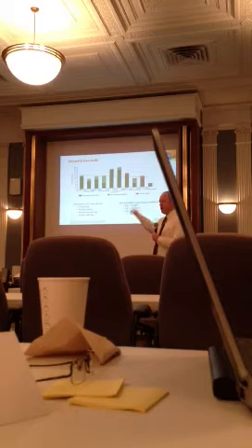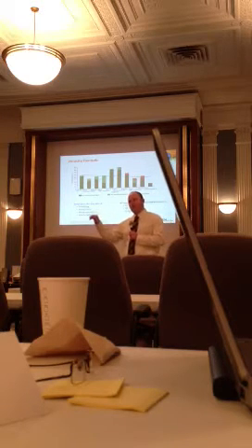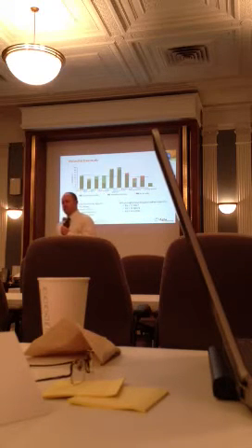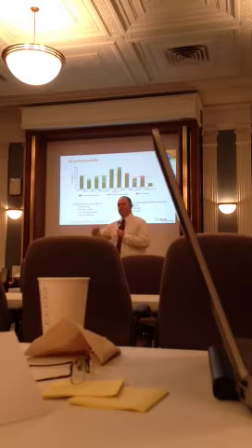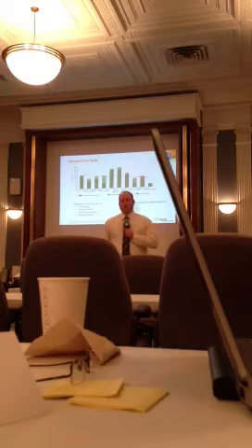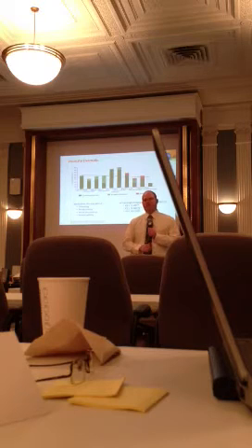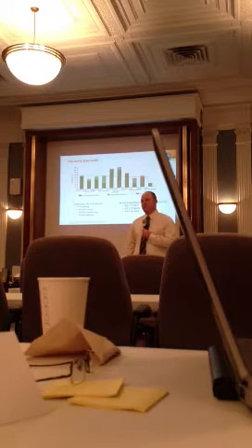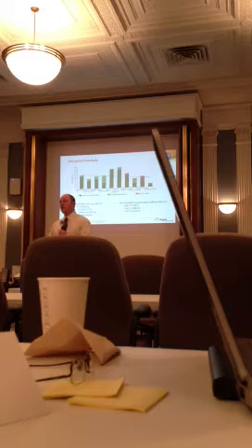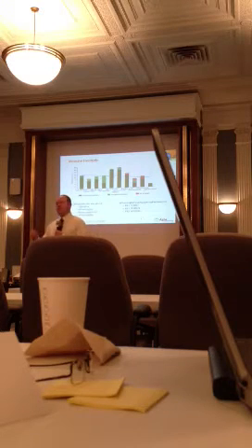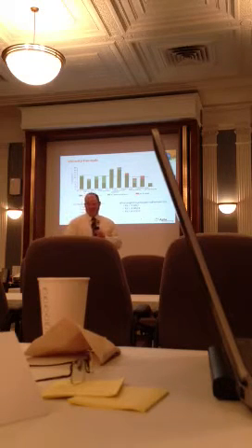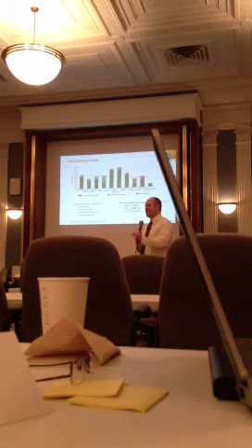So I let my team commit to 100, knowing that with a full staff operating at full effectiveness, we get acceptance in an iteration of 105 story points. Knowing that we had 20 carryover from the previous iteration, and potentially 5 from the iteration before that, but those were probably already handled. What does that mean about those 20 from that previous iteration? They just needed to go through the acceptance part of it, which is very small. Excellent. Those 20 story points were mostly done.